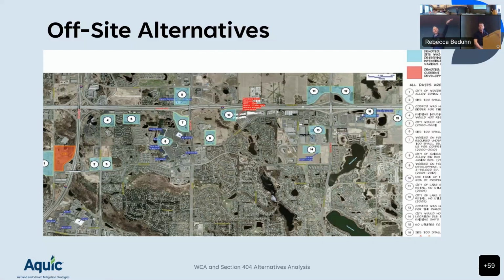And they give the number one, the big reasons why they weren't able to do it. Zoning, infrastructure, freeway access. Those sorts of very legit reasons were why they X'd that alternative out as a feasible site. So they had very clear screening criteria where they were able to eliminate sites and document why. They were able to very well articulate, this is what we need, why we need it, and these sites, for these reasons, don't meet that purpose.